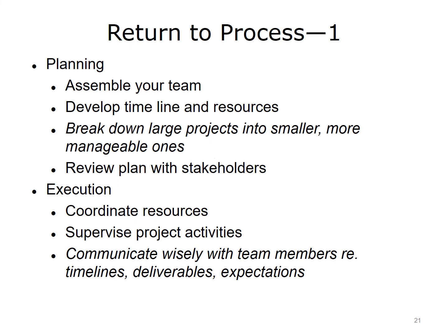So you might take a complex project, such as digitizing a medical office's paperwork, and break it down into manageable parts. These might include one project for converting records to digital format, another for training personnel to use the digital database, and then a final project to post the database online. This process allows you to step up to meeting the overall objectives of the project by reaching achievable goals and